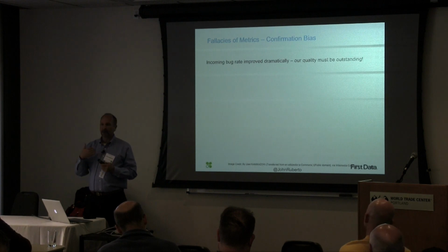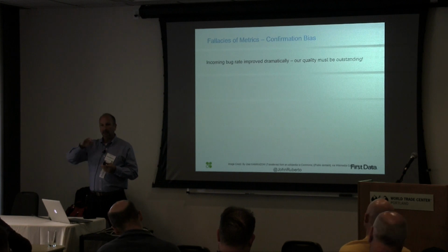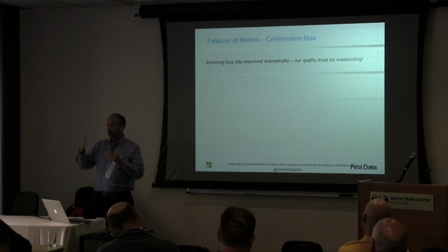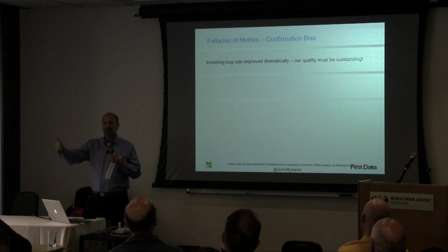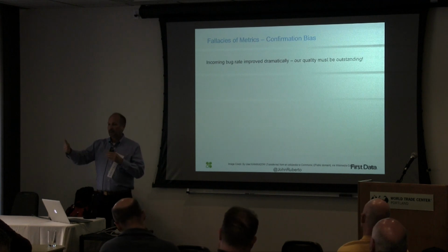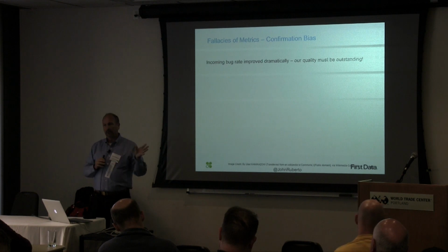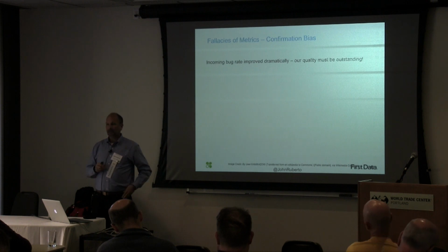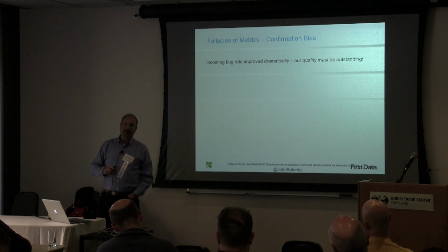One of the things we always look for as a test manager is when that incoming rate starts to slow down. That means we are finding fewer and fewer issues, and therefore it makes sense to release maybe to the next set of customers, because you're getting to the end of your testing. And indeed, one day it tailed off and flattened out. It went from 30 to about 4 bugs a day. The release manager got all excited and sent out this great email about how the QE team's incoming rate was tailing down. But he forgot something.